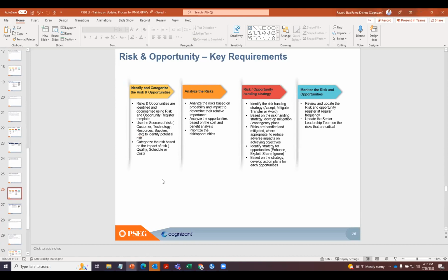Okay, but if you say, hey, use some kind of categories: identify all the risks which can come from the customer, identify all the technology related risks, identify all the risks related to resources. Then, if you use source of risk as a category, what happens is you check everything. There's a high probability that now you identify all the potential risks. For that reason, we need to do some structured risk identification workshops. Okay, so once you use the sources, then you need to identify those risks.